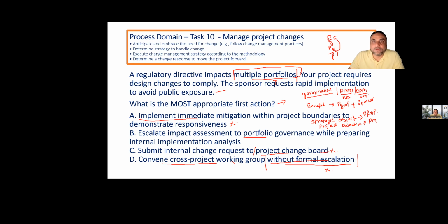Project manager. If the risk is related to the value or business objectives, who should handle it? Product owner. Very good. This is the basic information.